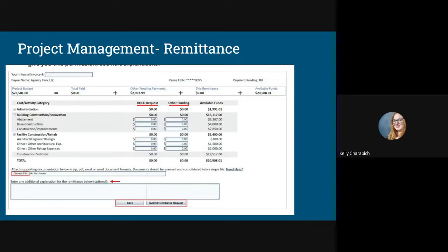So if you attended the grant management workshop in January, we do have a new cover sheet, and that should be on the website soon. If you do not have the new CAMS remittance cover sheet, email your CDS and we can send it to you. We like to see invoices for everything that you're getting from us, and I think everybody would agree with this, we want them in chronological order as you list them on the remittance cover sheet. We also want the pay apps if that's applicable. Anything that we're paying, we need to have documentation for it. Canceled checks as well.